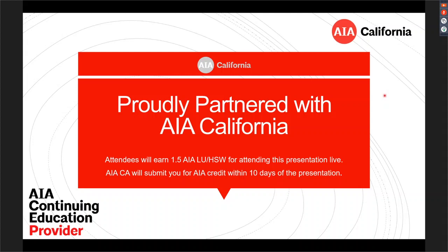Thank you, Richard. That's a clarification that we were looking for: if it's going to take a lengthy amount of time to review a proposed NMA, even if it is a UL listing, but it has 76 or 86 or 100 UL listings submitted as an NMA, then it's going to take more than 5 or 6 minutes to review. Correct. Now, again, if it's one listing or two listings and you're just adding them, it should be no big deal. Should be an NMA. Great. Thank you, Richard, for that.